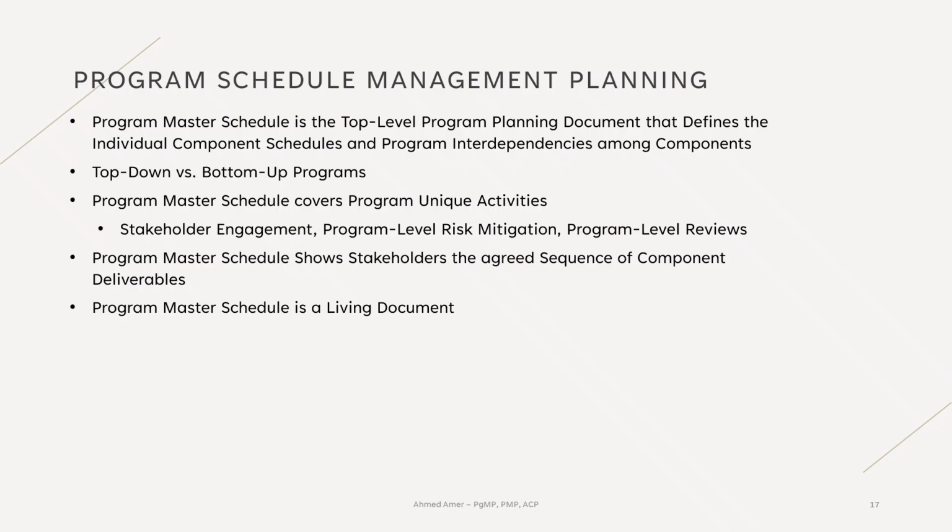As a living document, the program master schedule helps the program manager identify risks and escalate component issues that may affect program goals. While we are talking about risks, please note that program schedule risks identified during development of the program master schedule should be added to the program risk register.